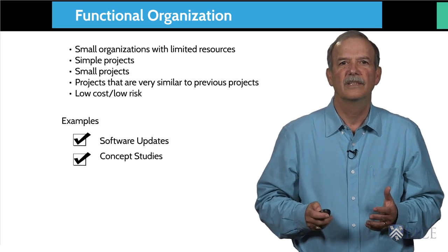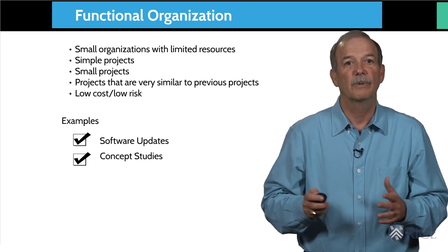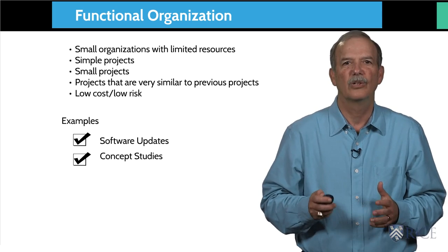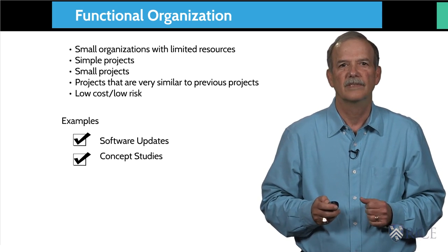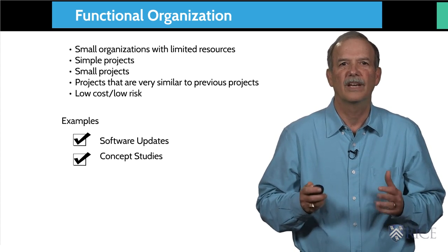These are the studies before the project is authorized or even fully defined. These are typically done by staff members within their function and prove whether or not the larger project is worth pursuing. Until a project proves economic, it's not usually worth creating a project team.